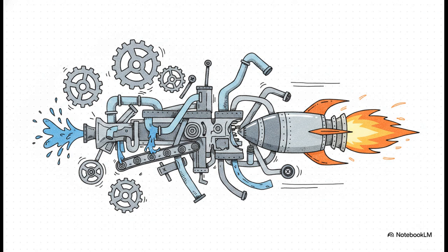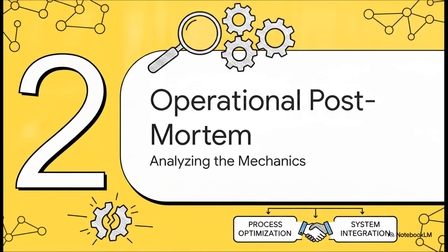You must mandate a process-first approach, where workflows are optimized, standardized, and cleansed of redundancies long before any software is configured. Detailed Operational Postmortem, Section 2.